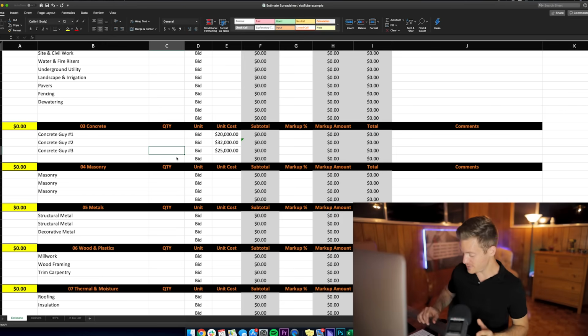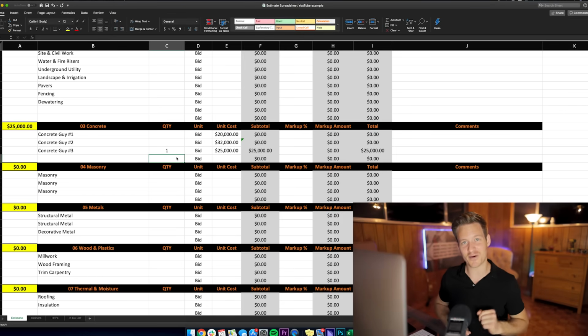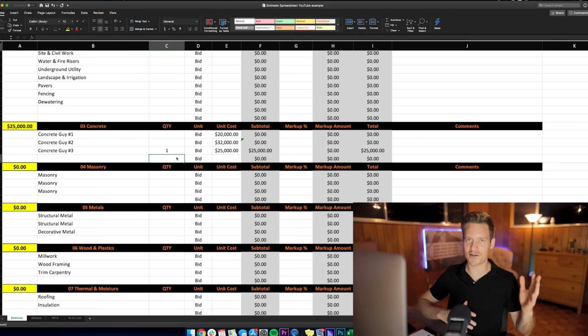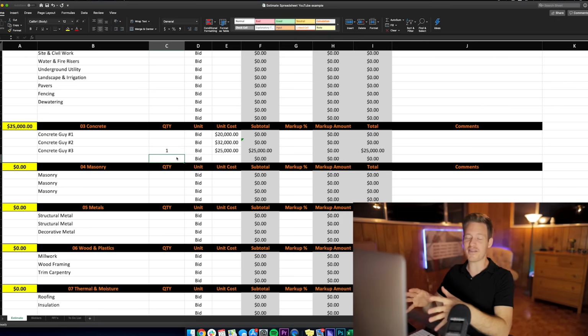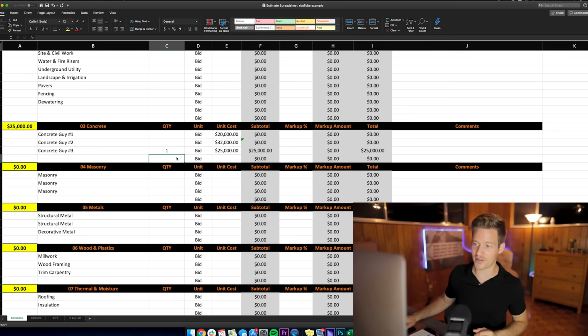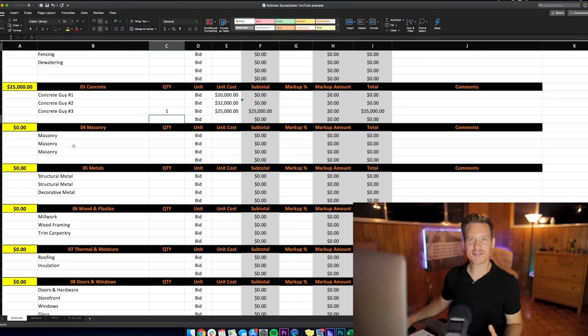So what you want to do is put a 1 by the concrete guy number 3, for $25,000. So now what you've done for concrete, you're giving the owner a price of $25,000, for example, on division number 3. Let's say there's no other concrete work to be done and just call it good. You might want to cover some for if you have to do plumbing, trenching or something like that, but let's just say good to go, $25,000. This is the price going to the owner because here, the highlighted yellow number is what I call it. Okay, so you get the point.